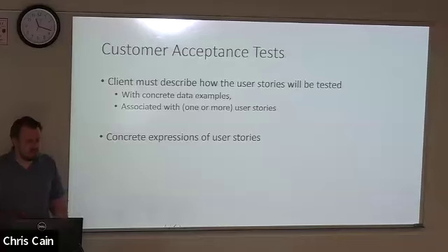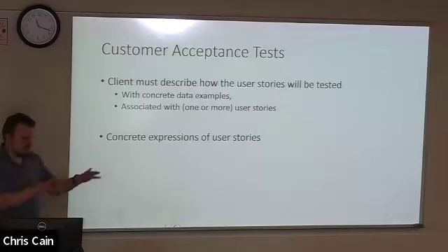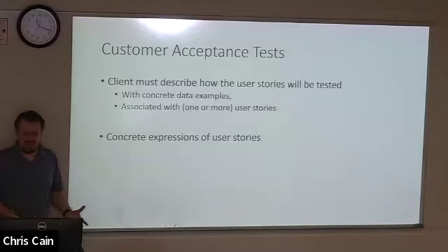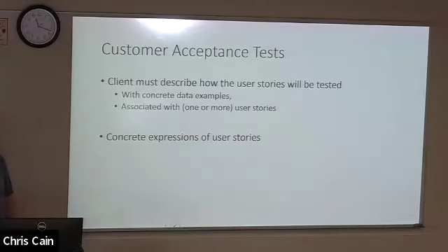Either you weren't concrete enough, or you didn't think to ask them to clarify what they mean by something. There are different ways to interpret those user stories. That's a lot of where communication breaks down, when you don't ask enough questions to know exactly what they want, so you can put exactly what they want into a user story. That way, when you, the technology expert, go implement it, you come back and say, I did this and that, and everything that there's a user story for. There should be no interpretation after that point. Good user stories lead directly to acceptance tests.